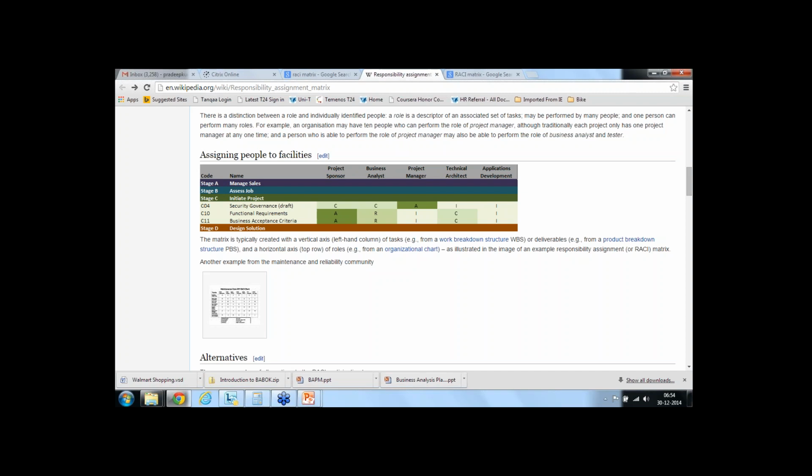And then you need to have a provision for the date, on what date they provided the comment. This is very critical because in case of a dispute, you may be able to use this information. The other one is a column for providing the feedback, and you also need a column to denote who provided that feedback.